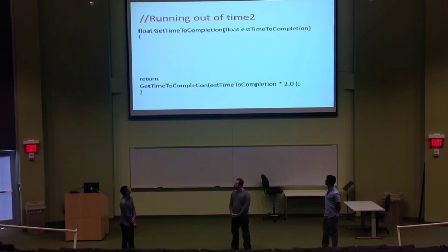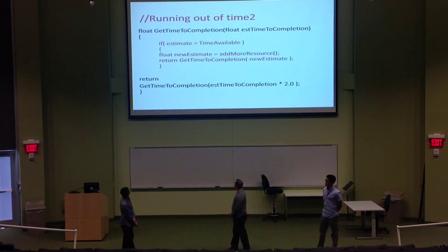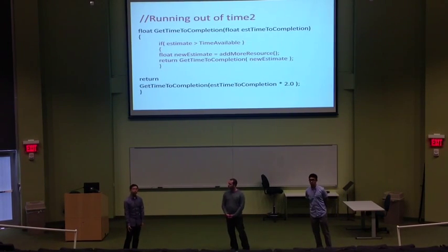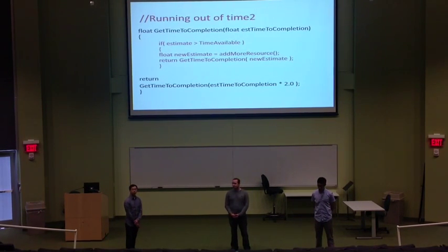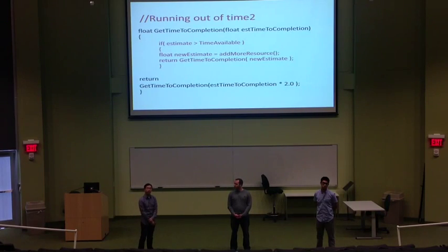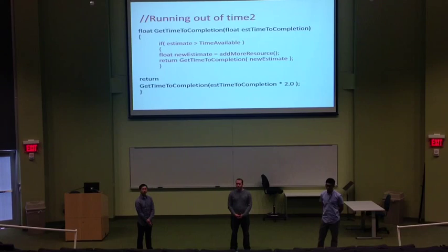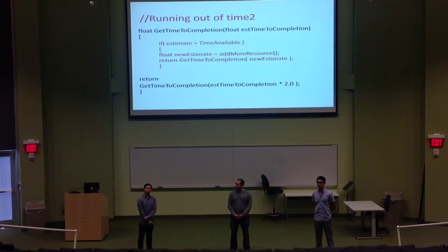And we have a second case. In the scenario where we are running out of time, another way to deal with it is to add more additional resource to the project, more people, and to do the work faster and more efficiently in the same time frame, so the time actually doesn't change when we put in additional resource to the project.